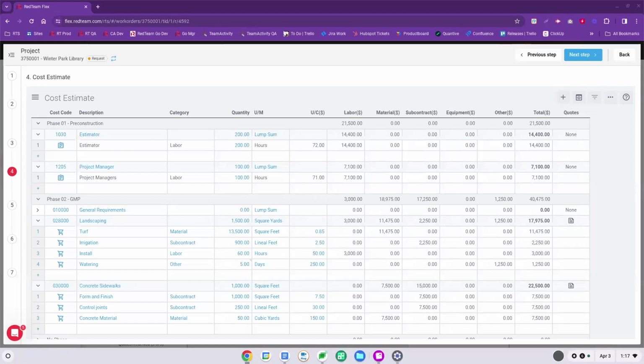And that's going to show up then if you decide on this project to include your list of negotiated pricing, then the client's going to be able to see exactly what that costs them for the number of hours you're proposing. Whereas you only see the cost. You see the cost on your side, the estimate. That's not visible to your client. The client sees the price separately.